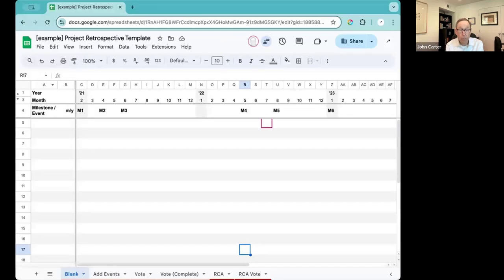And the theme is very important because the theme sets the stage for the retrospective. Is the retrospective about speed? Is it about efficiency? Is it about innovation? Is it about defects? So what are you trying to get to? And then with that in mind, the product managers leading the preparation create just a handful of events, and they bring that to the team, partially fleshed out, and then they have the team flesh it out together. And you'll be amazed at how many things the product manager missed in the project history that were really important.